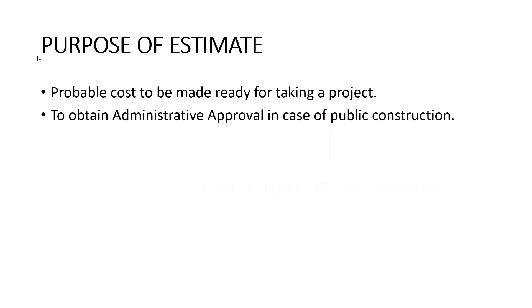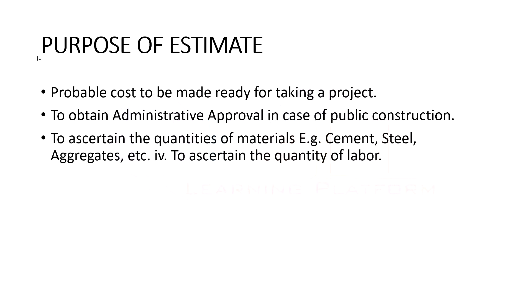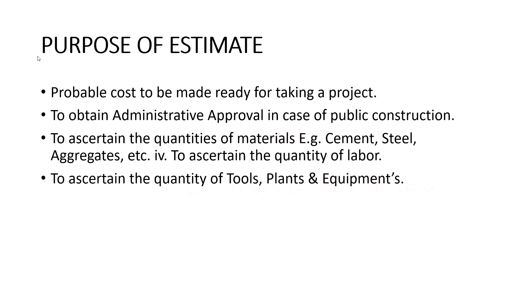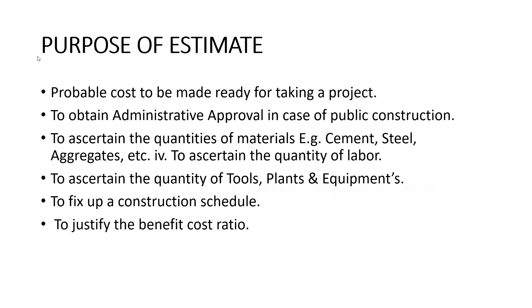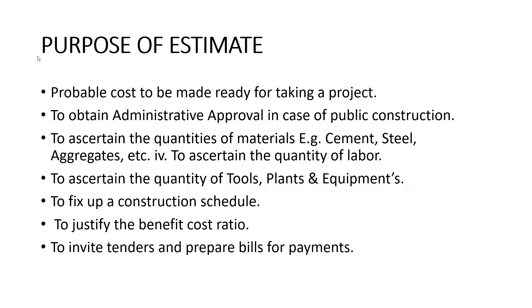The purposes of an estimate are: to arrive at a probable cost before taking up a project; to ascertain the quantities of materials such as cement, sand, and aggregate; to ascertain the quantity of labor required; and to ascertain the quantity of tools, plants, and equipment.